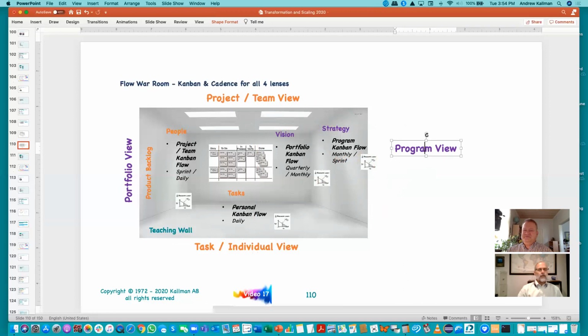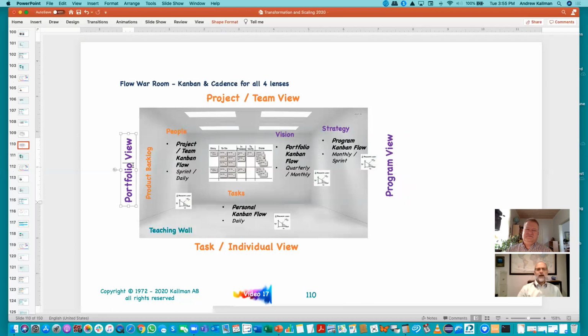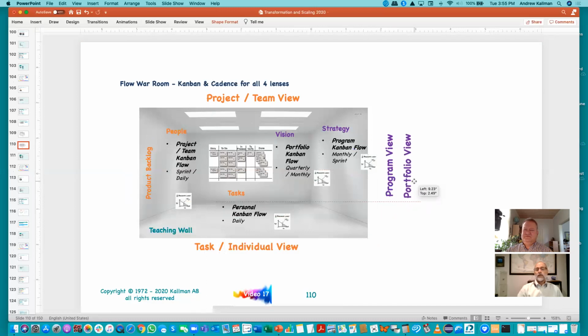But for me, one of the keys, and we emphasize this with the team, is that my rule of thumb is it should only take 5 minutes to get ready for any review. And that's to notify people what time, and then the team decides who's going to talk about what, because everything's on the wall. What you're working on is there. And so visually it's available, and you walk the leadership through it, or visitors. And then once people get familiar with the wall, then it's not overwhelming because they understand the detail behind it and the flow of the material within the wall.